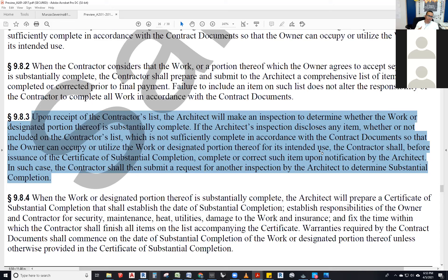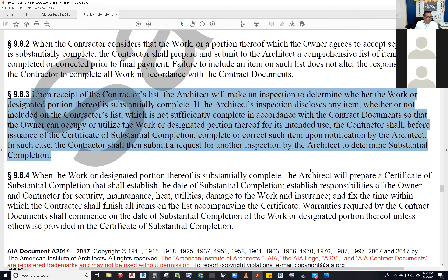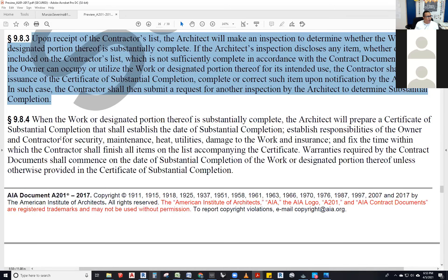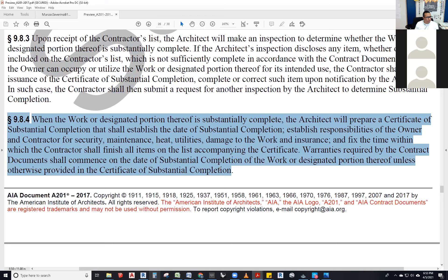The contractor shall then submit a request for another inspection to determine substantial completion. If they never finish it, the architect is entitled to additional services for making repeated visits. And ultimately, the owner could actually dismiss the contractor and get another one — very sad, but it can happen.